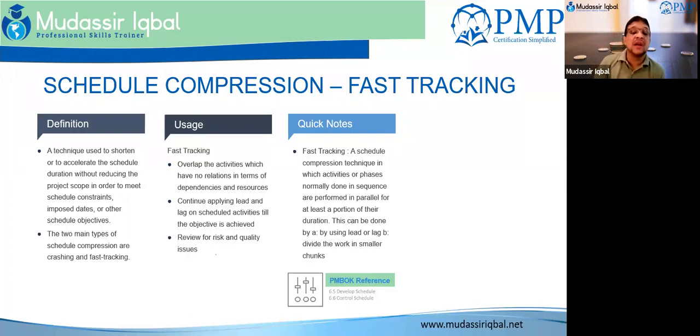Fast tracking will add the risk and crashing will add the cost to your project. And you need to understand that if you do a lot of crashing, it will not give you a result. And if you do a lot of fast tracking, again, it's speeding up things. Haste makes waste. So it's risky to your project. Be careful whenever you are using crashing and fast tracking.